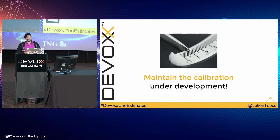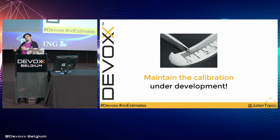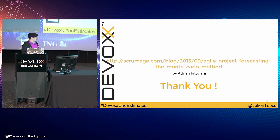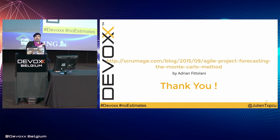Another complicated aspect is maintaining the calibration of your tasks during development. If you've started something and it takes more than two days of code to finish, you have to split what you're currently doing, create new tasks, and release in production what you've done. If you're not doing TDD, that's impossible. So that's all I've got. You have the link to Adrian Fittolani's blog where you can find the spreadsheet and more explanation on how Monte Carlo works technically — and there's a talk on InfoQ. Thank you.